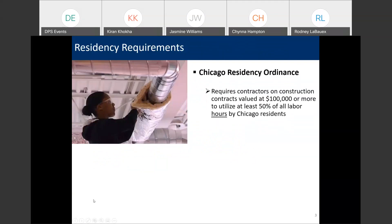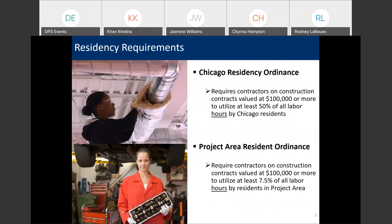So, we're going to start by talking about our residency requirements. It's important to the city that if we're spending city dollars, which ultimately come from taxpayer dollars, that we ensure that city residents are benefiting from projects. The city council passed the residency ordinance, which is in municipal code section 2-92-330, and this ordinance requires that contractors on construction contracts valued at $100,000 or more utilize Chicago residents on at least 50% of all labor hours. In addition, at least 7.5% of the total labor hours have to be performed by project area residents — meaning the actual area where the construction work will be performed.